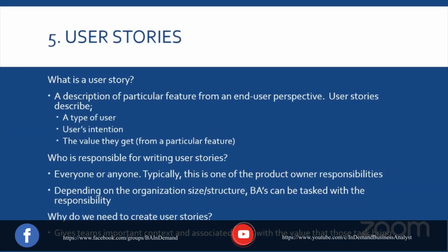So we write that on the front of a 3x5 index card. If you flip it over, on the back side you write some use cases: a precondition, what things need to be in place for this function or feature to perform, and then an acceptance criteria of how to validate that this use case works. So what you said is absolutely right. You just need to reverse it.